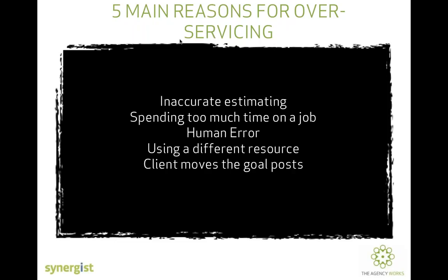If the client is moving the goalposts, you should always include that in your estimate, whether in a separate area, which is probably recommended. That will enable you to see that capacity is now full in a week or months to come, because our client has changed the brief slightly.